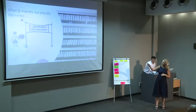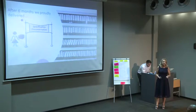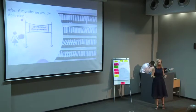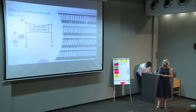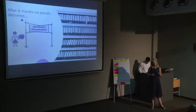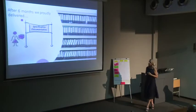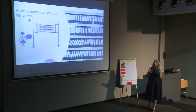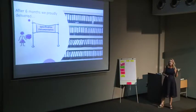Once the customers read through all those lever arch files and signed off, we went away with our IT people and they started coding, developing, and designing screens. About 12 months later we started rolling out the first module. Over a period of six months we did a POC with different modules in different business units, and 18 months after they signed the contract, they finally went live with the HR system.